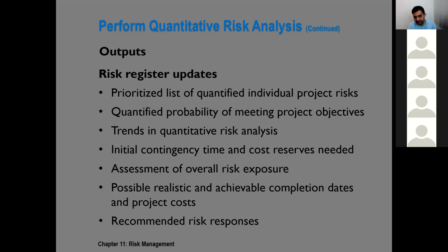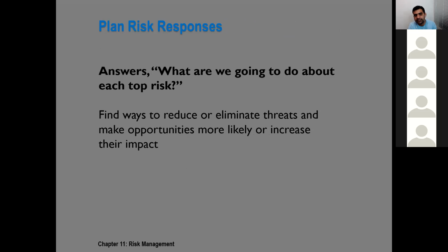And based on that analysis, we can later develop our risk responses. What are risk responses? This is a risk, what to do with it? Do we need to take action straight away, or should we prepare an action, and once the risk comes, then we will apply that action? Or we need not take any action at all because probability and impact are much less. So this is finding ways through which we can reduce the risks which are negative and increase the probability and impact of those risks which are positive.